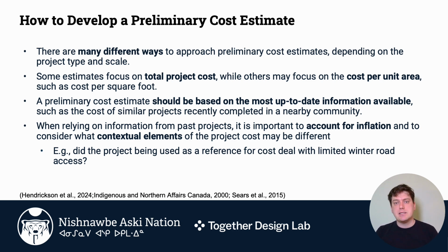Those can be the precedents that I mentioned before. They can be construction industry cost guides, and those are kind of standards that are produced by industry professionals to show how construction costs are changing over time and in different contexts. And it's also going to be really important to consider your local conditions. In the context we're talking about here, there's a lot of local factors that aren't captured in those cost guides that you're going to need to know to think about the feasibility of a project.